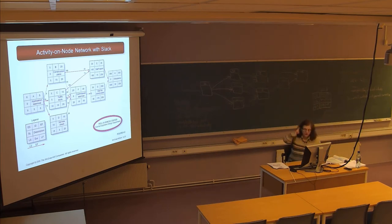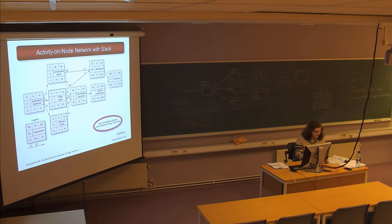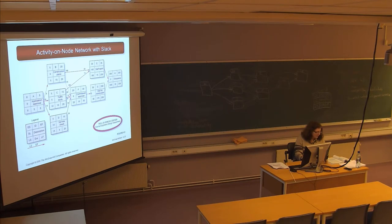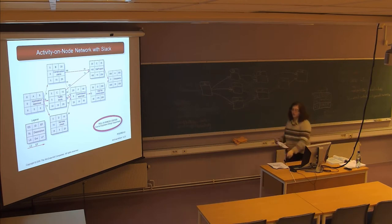One thing not mentioned in the notes but discussed in your book on page 175 is the difference between total slack and free slack. It's also in the diagram on page 173, figure 6.8, which shows total slack (TS) and free slack, which is zero in some cases. You don't have free slack on every node — you have it at the end of a chain, a series of events.